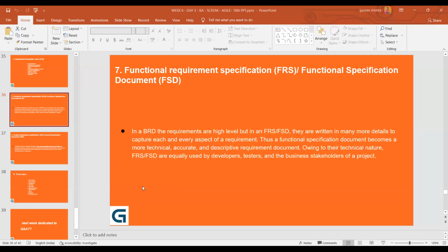So very good question. I would add something over here for Suchana. Yes, indeed, a very good question to understand because it came into the agile and Scrum. Earlier, we used to gather the requirement, and those gathered requirements used to get approved by the hierarchy, as Prerna said, by the seniors, and after their approval, it used to go to the customer for approval purposes, so that when they give the sign off to the document, the work will start.